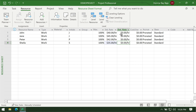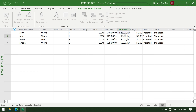We also need to assign an overtime rate, especially if there's a plan to render overtime. Even if there isn't, it's still best to put something here because MS Project may calculate a task as overtime, and your cost may not be right if you forgot to put something here. So let's say that for overtime, they are paid a bit higher.